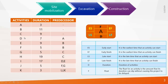I have listed a set of activities with their duration and predecessors. Before going into it, let's see what activity, duration, and predecessors mean. Look at this construction process: the first process on site is mobilization, then excavation, then construction. Every activity has a relationship to others — some activities must wait until others complete. This logic is called predecessors and successors, and the time each activity needs is called duration.